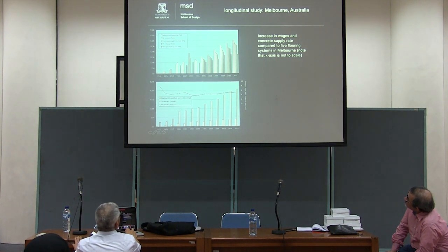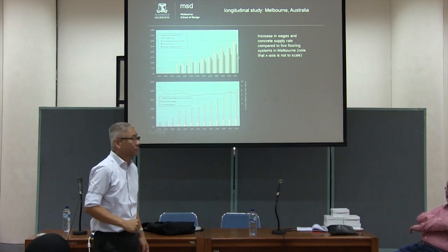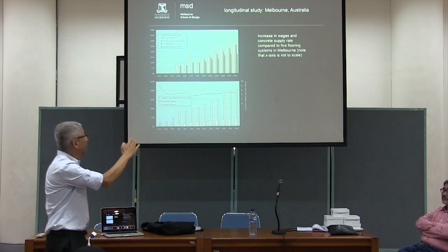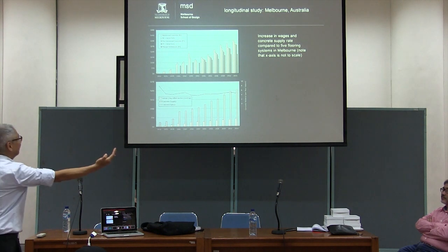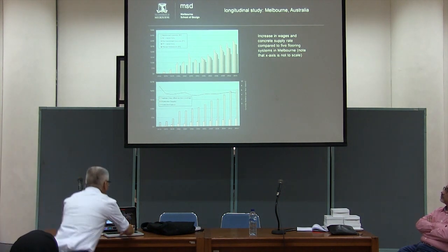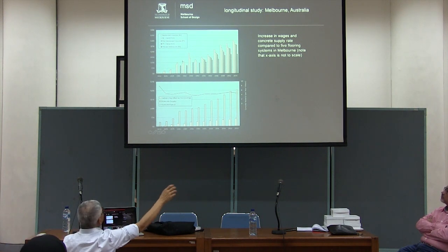Reinforced concrete metal formwork, post-tension concrete, post-tension metal formwork, precast. So the most expensive is reinforced concrete today. The cheapest is precast. But if you turn back the clock, you can see, well, some of those technologies were not available back then, right?